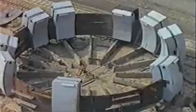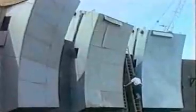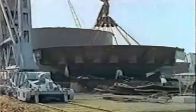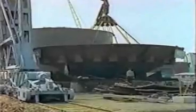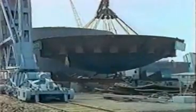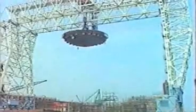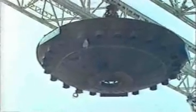Here you see number 2 ring nearing completion. By using a Goliath crane, the top of which can clear even the height of a finished reactor building, the civil engineering work was allowed to forge ahead without being halted for the installation of heavy plant. This is the bottom ring again, all 200 tons of it, ready and waiting installation in the reactor vault. We were becoming used to the way in which the Goliath handled such loads, but the crane dimensions overshadow the size of the ring.